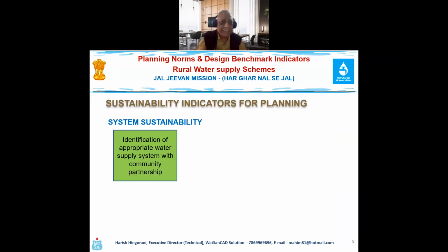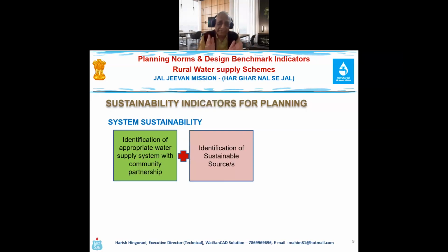Further, first of all, I need to have identification of an approved water supply scheme with community partnership. I will take up a single village, maybe a solar scheme, maybe a multi-village scheme, maybe retrofitting, maybe augmentation. Whatever is required has to be identified sitting with the community during the VAP, right? Secondly, what the JJM guideline conceives for such a scheme, once a scheme is decided, is discussion with the community, with technical input given by the ISA or whoever is acting as nodal officer for technical support. Source sustainability is the most important issue in planning. So the next step will be